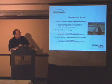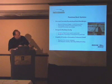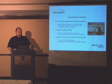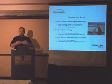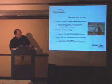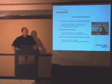For roadway quality design, there are a number of different ways to panelize a concrete deck. But if you key it or match cast the panel to panel joints, then if it is truly match cast, it's a bumpless transfer from panel to panel. And the focus is on making it capable of being installed by county crews. It's a simple installation. If it's truly just bolting together, leveling, and setting on abutments, you can use your county crews, or a much lower-cost excavation contractor that can set a bridge, versus having to go out to a trained bridge contractor.